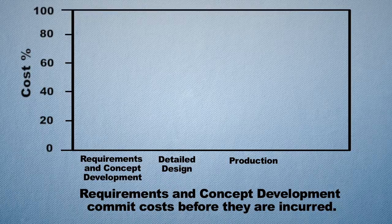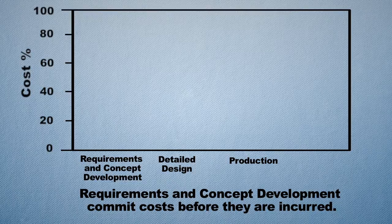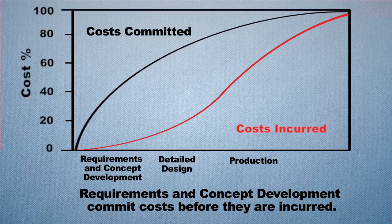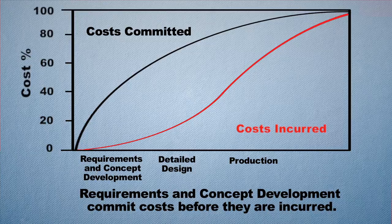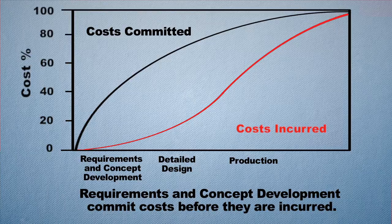On this graphic, the x-axis is the timeline from beginning — pre-phase A — all the way through to the end of phase F. The y-axis is cost by percentage of overall mission or system development cost. You can see that early on, following the bottom curve, as you're going through and defining requirements, you're not spending a lot of money. You only have a small team, mainly systems engineers, so the actual cost incurred is fairly insignificant.